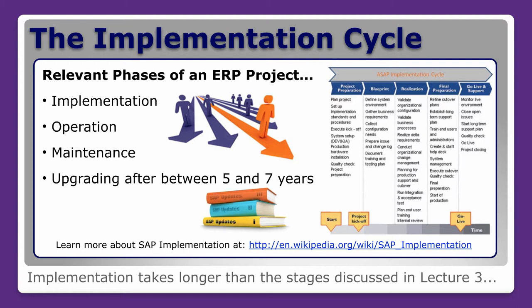In the blueprinting phase you'll be defining the system environment, gathering business requirements — deciding what the system must do — collecting configuration needs, issuing a change log to track what's done during the whole project, documenting, training, and producing a testing plan. Not only do you need to train employees, but you also need a formal procedure for testing all the hardware and software that's going to be installed.